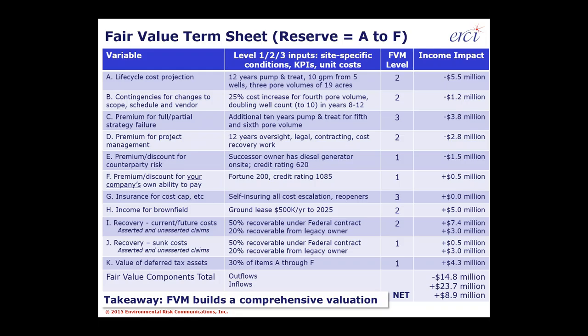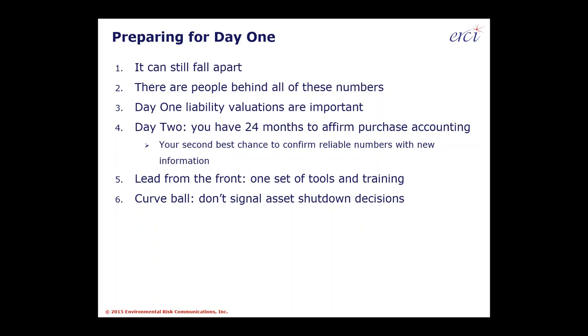The next item — contingencies — covers changes to scope, schedule, and vendor. For example, an assumption of a 25% cost increase, pumping out a fourth pore volume, and doubling the well count from 5 to 10 wells in years 8 to 12. That's a level-two assumption with an associated cost. For an individual site, this is what good due diligence looks like — getting the inflows and outflows on an expected value, present value, and fair value basis. This is what due diligence needs to look like because it provides that comprehensive evaluation that prevents deal teams and accounting teams from getting blindsided at day one.